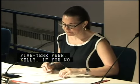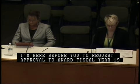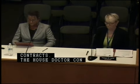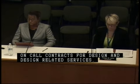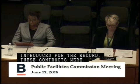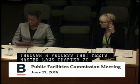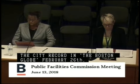Good morning, Commissioners. I'm here before you to request approval to award the fiscal year 19 through fiscal year 23 house doctor consultant service contracts. The house doctor contracts are on-call contracts for design and design-related services. These contracts cover the 9 categories which were just introduced for the record. These contracts were procured through a process that meets Mass General Laws Chapter 7C requirements for design service contracts. The advertisement appeared in the City Record and the Boston Globe on February 26, 2018, and in the Central Register on February 28, 2018. 70 statements of qualifications were received on March 28, 2018.